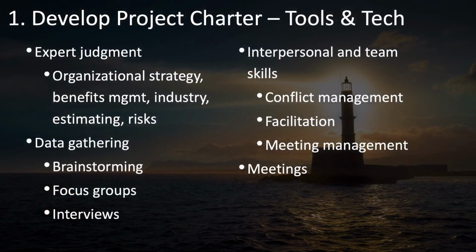The four main categories of tools and techniques for developing the project charter include expert judgment, data gathering, interpersonal and team skills, and meetings. Expert judgment is an important one to consider. Make sure that as you put together the project charter, you consult as appropriate with experts both inside and outside your organization. Those that are experts in organizational strategy or benefits management, or who have deep technical knowledge of the industry or focus area of your project, that have expertise in estimating durations, costs, and budgets, and in identifying risks.